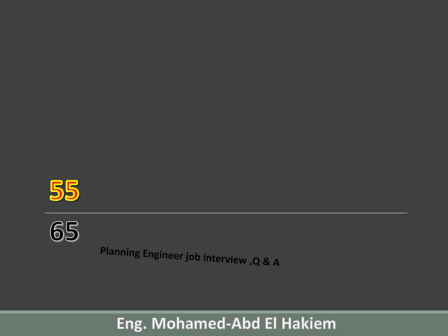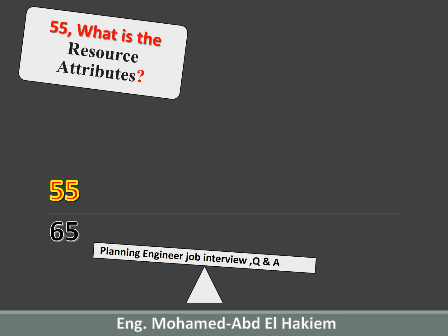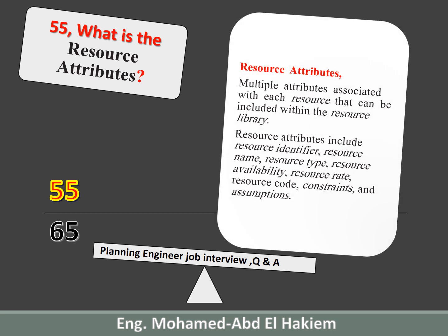55. What is the resource attributes? Resource attributes, multiple attributes associated with each resource that can be included within the resource library. Resource attributes include resource identifier, resource name, resource type, resource availability, resource rate, resource code, constraints, and assumptions.